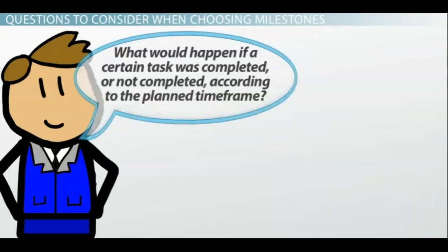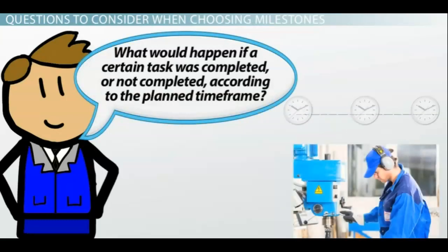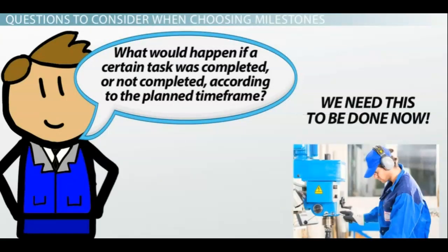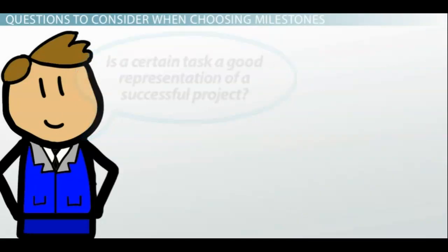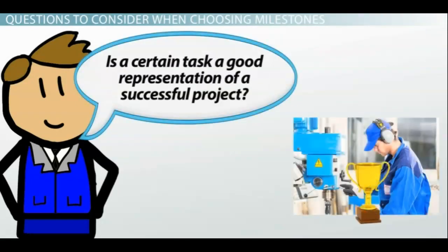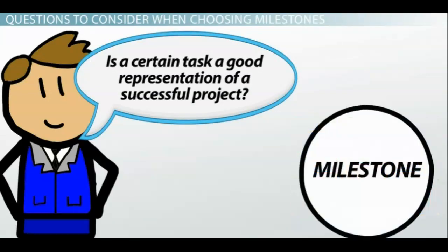You should also ask what would happen if a certain task was completed or not completed according to the planned timeframe. If the impact is detrimental to the project, the task could be a milestone. Finally, you could ask, is a certain task a good representation of a successful project? If you answer yes to this question, then again, it could be a milestone.